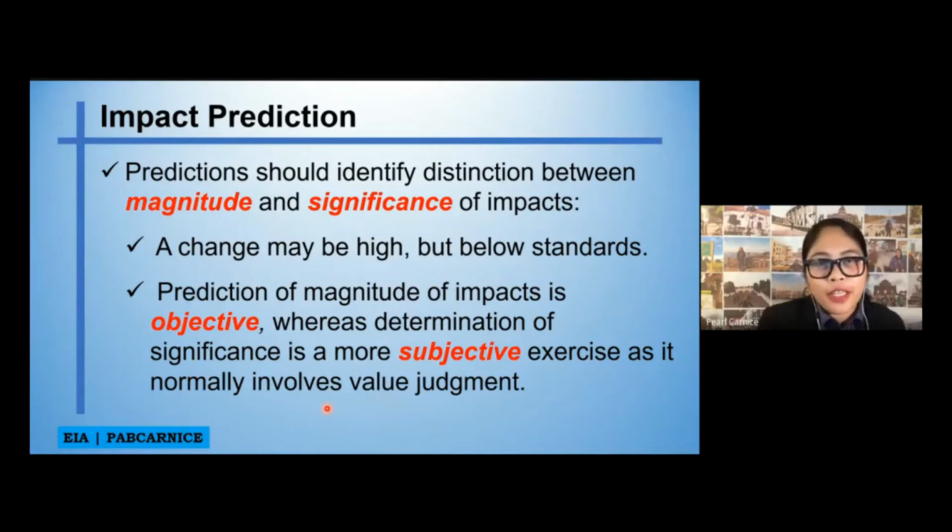There has been a change of water quality, and people are identifying that the cause of it is actually your poultry business because of your wastewater, let us say. Based on your reference, based on your water quality baseline information, you can say that there is a difference as to the water quality before the project started and after 5 years that your project started.